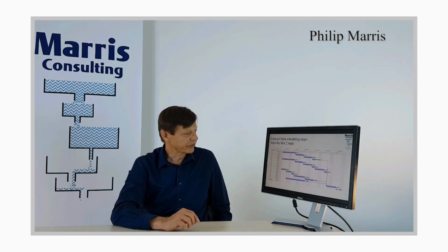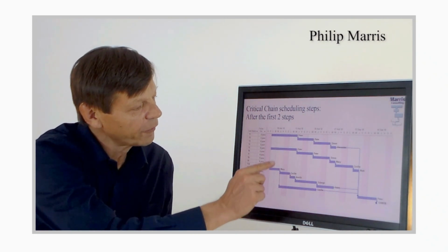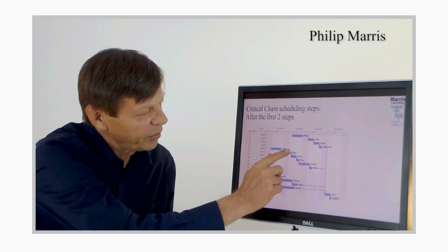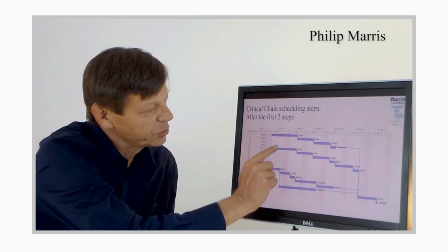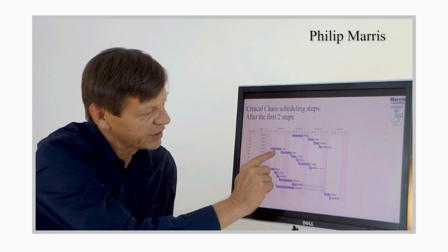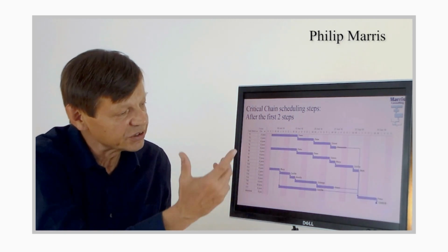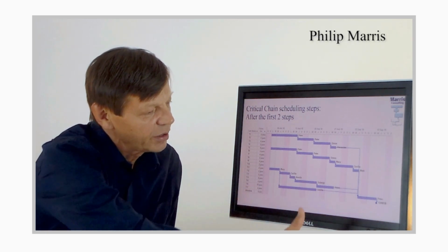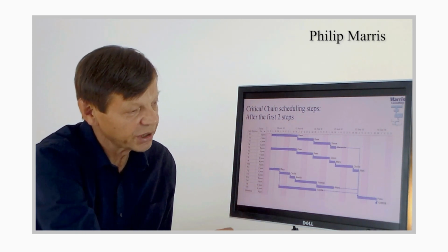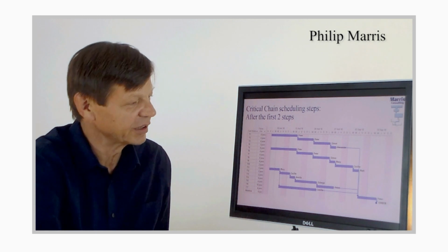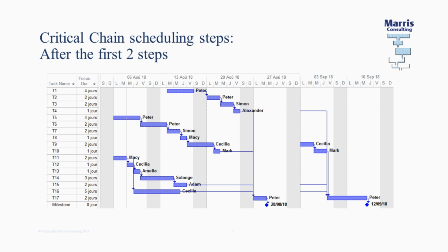So, in this particular example, just to summarize, if we apply the first 2 steps simultaneously, this is what it looked like before, right? Peter had to do this and it took that much time, and after we remove the safeties, it's a lot shorter, okay? And Peter was doing several things at once, but now he's no longer doing several things at once, and it's been sequenced, okay? The sum of those 2 things depends on projects, but in this case, as you can see, the planning is shorter than it used to be, right? Because you did shorten all the times by 2, that's made it shorter. It's true then you've leveled, which will make it longer. Between what you've lost and what you've gained, you get something that is shorter. So those are the first 2 steps.